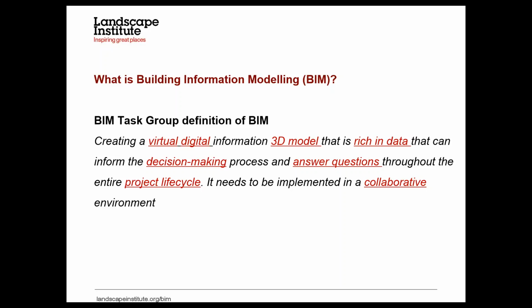Firstly, they're talking about creating a digital or virtual model. The idea is that if you can create it digitally and iron out all the problems in the digital world, that is most likely going to make sure the project is delivered on time and to budget in the real world. Because as soon as you start putting a spade in the ground, that's when costs and delays start happening when you add modifications.